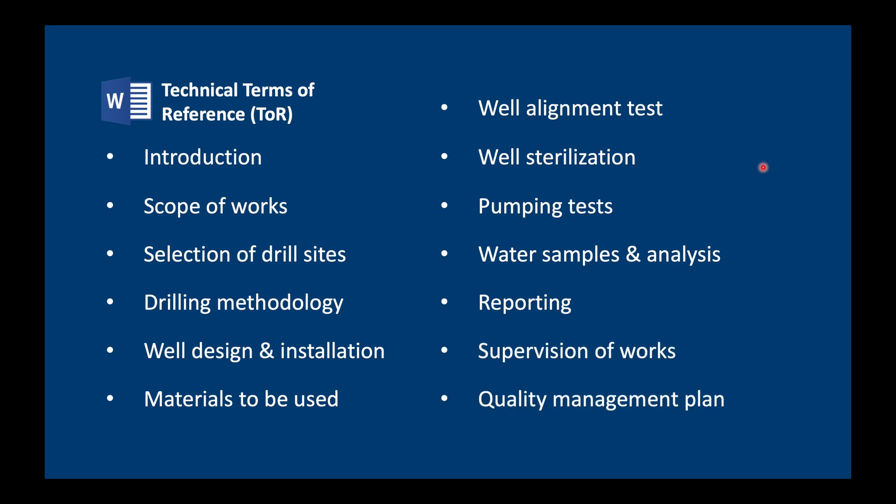Last but not least, what kind of quality management plan, health and safety, and environmental plans are required from the contractor before we can let them come to the project site.